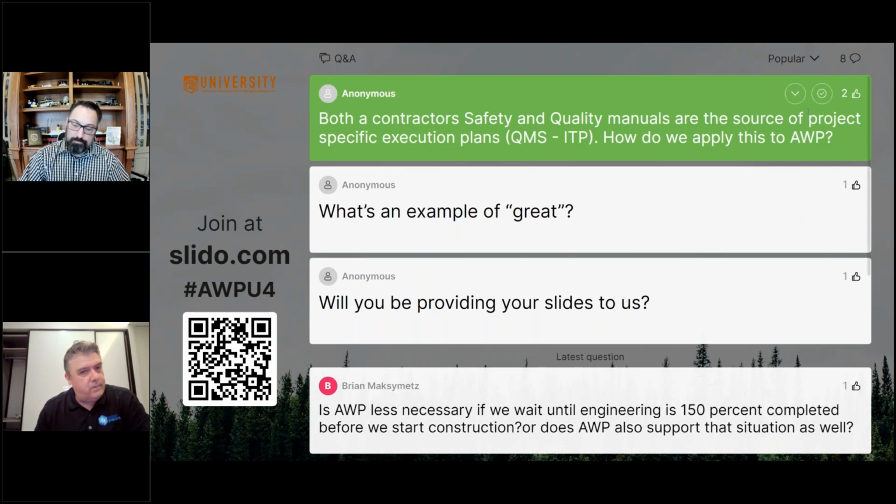Safety, dear and near to my heart. I mean, as you build your IWPs, that should be driving not just the IWPs themselves, clarifying review of that specific content, but I now have a technique on what are my high potential risk hazards ahead. A look ahead schedule from the IWP look ahead, what my hypo schedule is, and now I can start building a safety auditing plan to go out and get engagement on my hypo activities. What are my high risk safety activities? Embedding the IWP release plan with the safety observation plan being built for a project is just a number one.